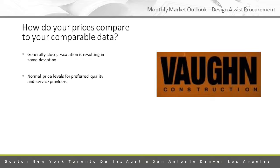It's more like maybe a pre-con assist or an early buy to do what we've dubbed cost avoidance, so that we can go basically buy a bunch of drywall and ceiling material now, get in line, if you will, and lock in that pricing, because there's a lot of ambiguity around where the drywall market's going to be in even 6 months from now. Hearing a lot of different things.